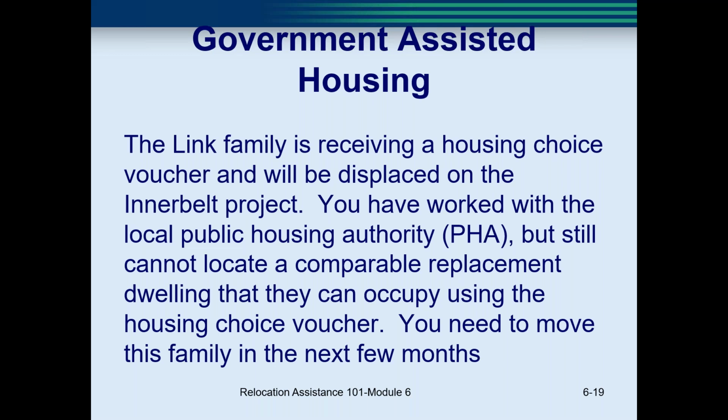So in any event, the alternative housing proposal, if there is any type of agreement to put them in either private housing or otherwise, all of that needs to be approved by the district real estate administrator. And it also needs to be approved by the central office section manager at ODOT.